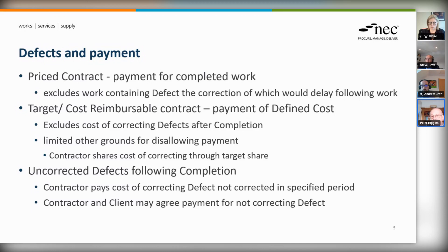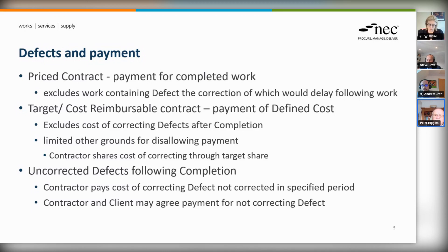There is a provision for correcting defects after completion where they're not corrected: the contractor must pay the cost of correction if it's not done within the defects correction period, which is normally a fairly short period. The contractor would pay the client for the cost the client incurs in correcting the defect itself — which could be substantially more than what it would cost the contractor to do the same thing. It's always possible for the contractor and client to agree to leave a defect in the work and agree a payment for it.